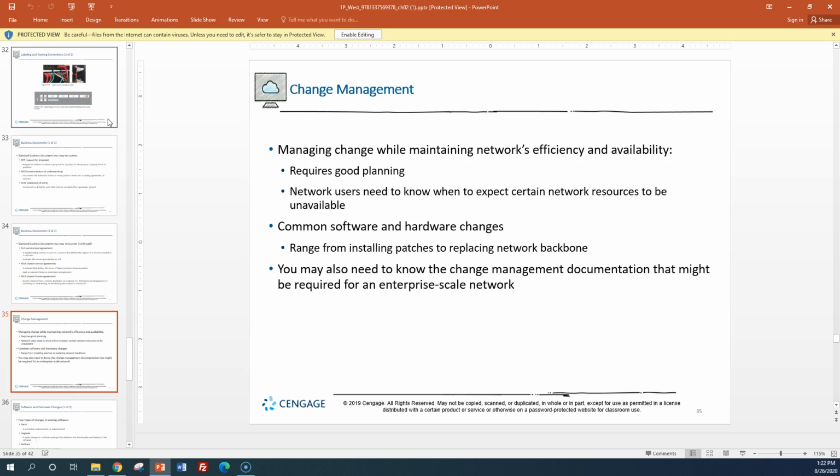So if I'm going to upgrade a router or switch out equipment, typically I not only have to look at that cost, but I need to look at the impact. I sometimes pay more to do things on weekends for a business. So if I'm State Farm and during the week I know I have 1,000 employees all on the phone, on the weekends I only have 500, I might schedule work changes on that weekend, even though I know I'm going to pay a vendor more, but it's cheaper than letting 1,000 people sit there idle and also ticking off my customers.